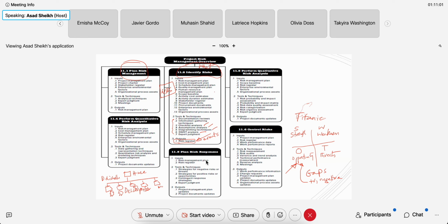Now that you have identified, let's say you've identified risk in different categories. So you have risk categories now. You got the engine risk, you got the risk for plumbing, you got the risk in the electrical component area. So you sort of have divvied up the risk by analyzing each type of category of components, and then said, okay, what could go wrong in those categories? So this is the tool that you use to sort of identify, open up things to see what's inside. And then you put all the stuff in your risk register.